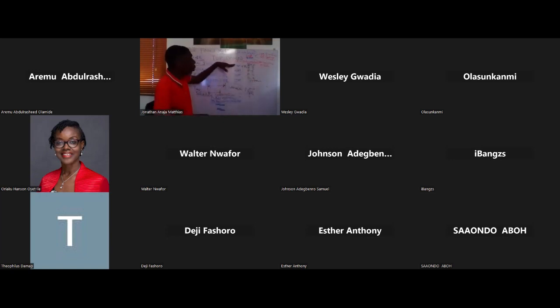So, in order not to affect cost, what did we do? We went to the scope of the work. That means we went to our WBS and we removed some work packages that had to do with finishing the 63 units. We removed them. So you can go to your clients and say, you are giving me 200 million, you want a 2-bedroom bungalow, no problem, I'll give it to you. By the time I did this project, your 200 million would have been able to do it. But because of the cost of materials now, realistically it's 250 million. But if you say it's 200 million you have, no problem.